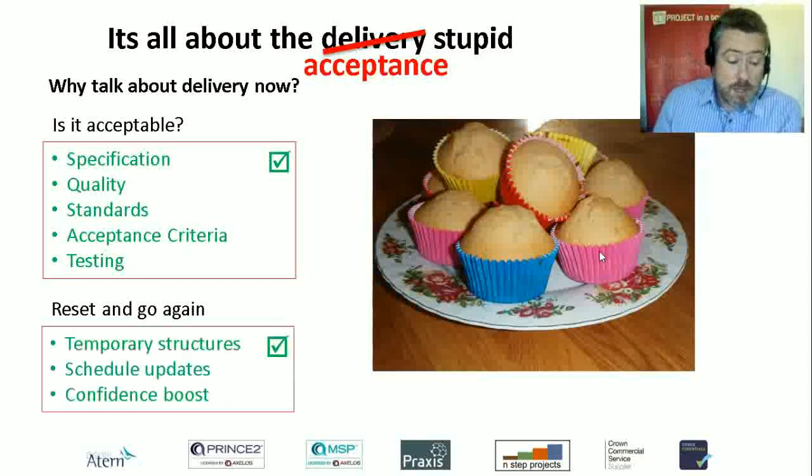And so, projects are temporary structures. They're not here forever. When you finish what you need for one thing, close it down, release the people back to their business, start again. Of course, this is a really good opportunity to update things like schedules, because until you've actually delivered the thing, you always think, well, yes, I'm halfway through it, but are you really halfway through it? The time you know when you are at a certain point is when you've just delivered something, because that's a very clear point, a marker in the plan.